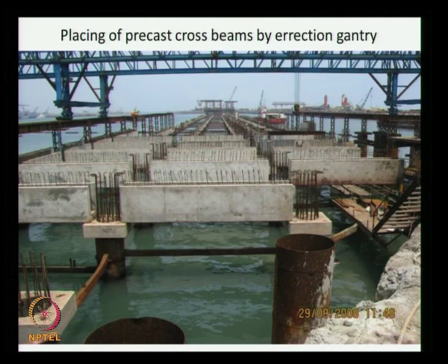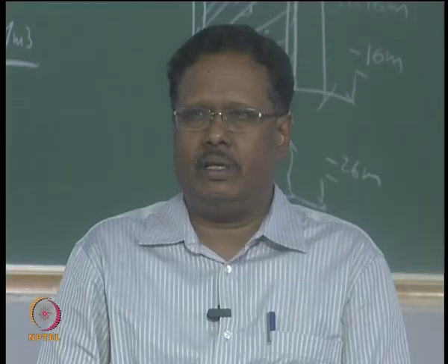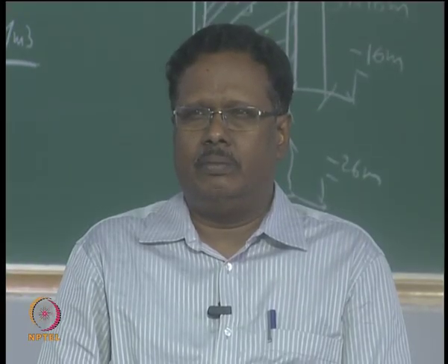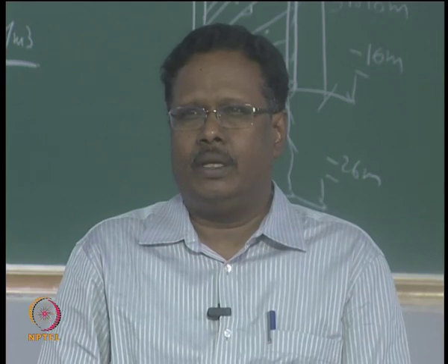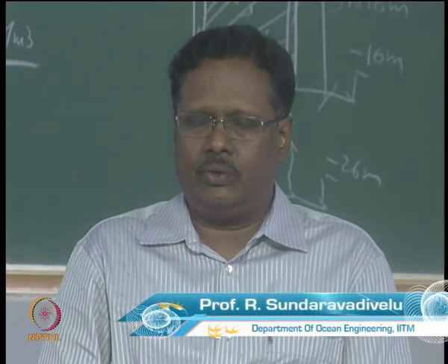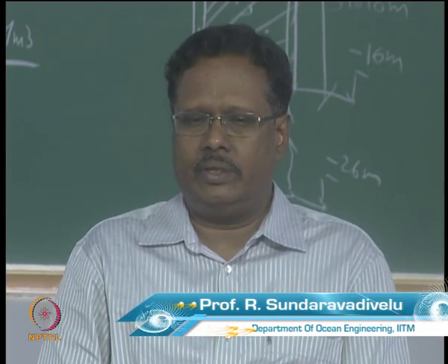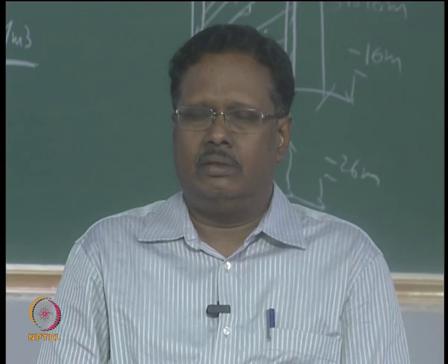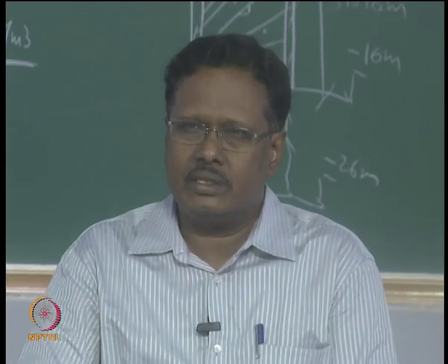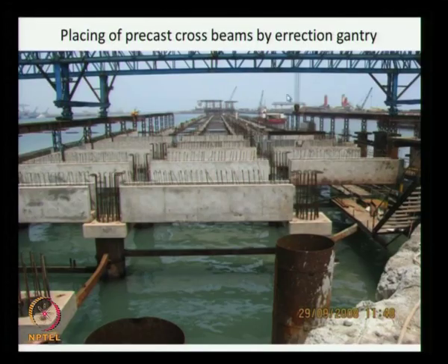There are certain requirements for doing the construction, because concrete will take 28 days to attain strength. So the gantry can be moved only after 28 days is realized for the pile. Similarly, you can lift the precast elements only after 28 days, but sometimes they will lift even after 15 days. Then once they finish the slab, if they want to move the equipment on top of the slab, that also strictly we have to do after 28 days. But they do the calculation of how much time is required, and accordingly what strength is achieved after 14 days or 21 days, they allow that. So once the structure is completed, then they have to remove the gantry also, and there are certain supports taken from the existing piles that also have to be finished.